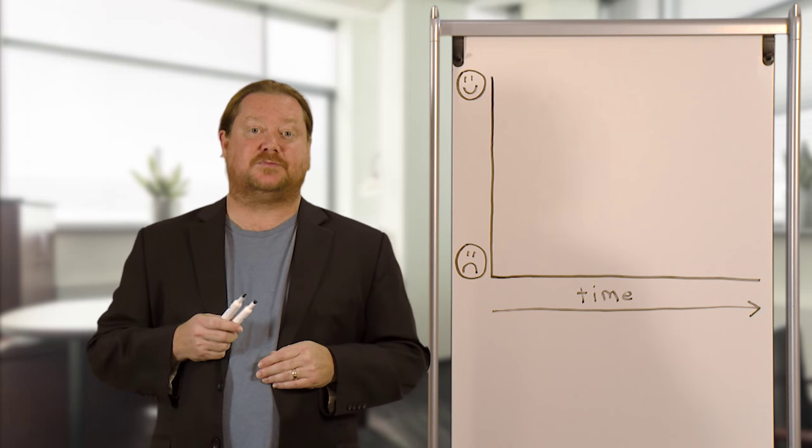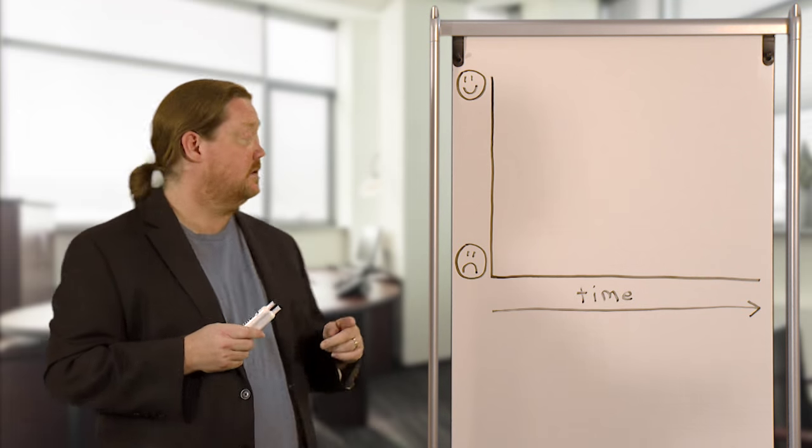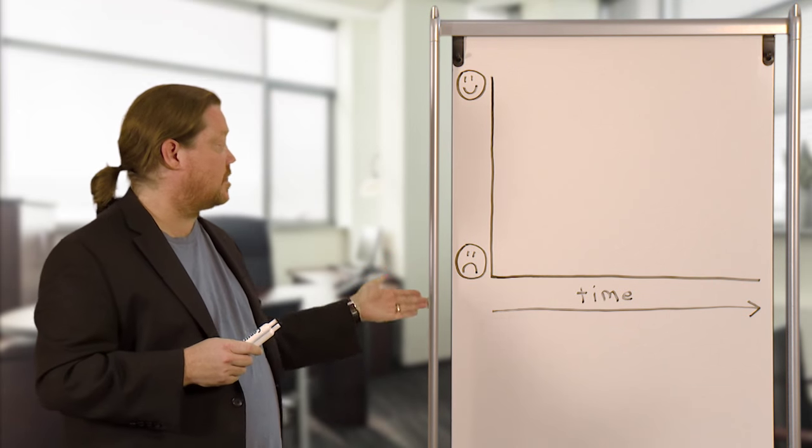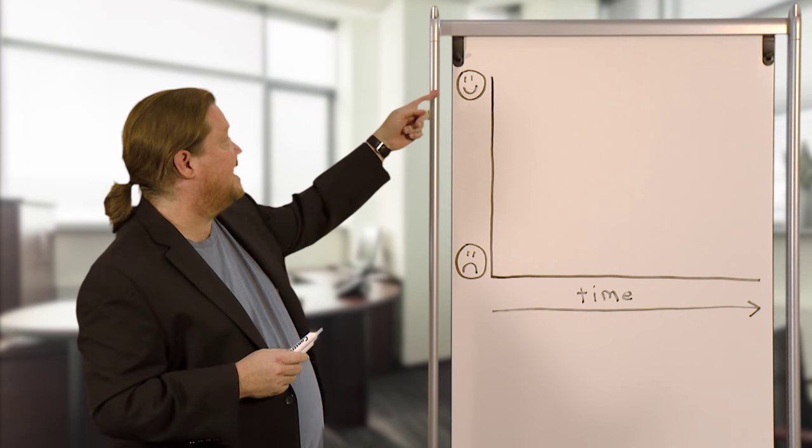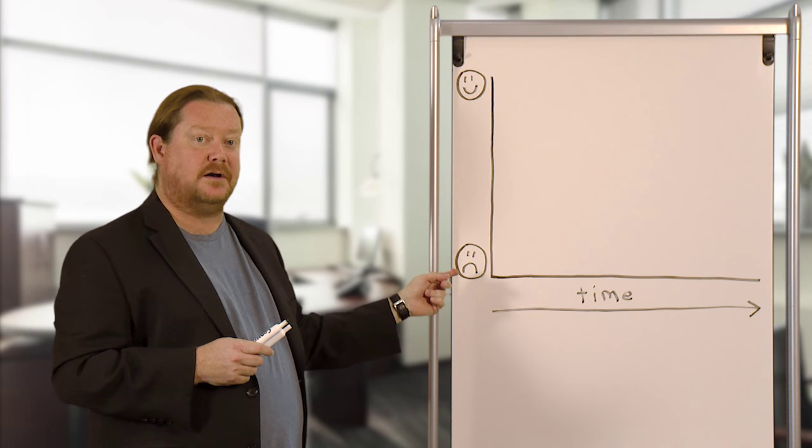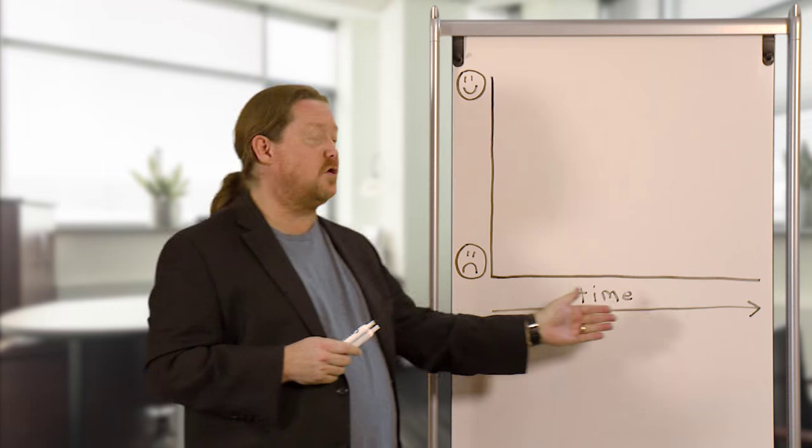In your retrospective, the facilitator, the Scrum Master, draws a chart, a graph, up on the wall on a whiteboard. Happiness at the top, unhappiness at the bottom, progressing through time over the course of the sprint.